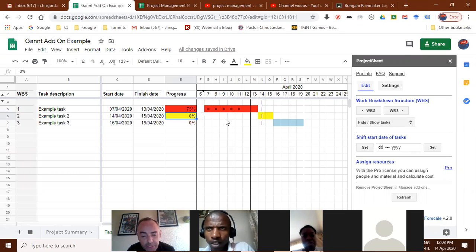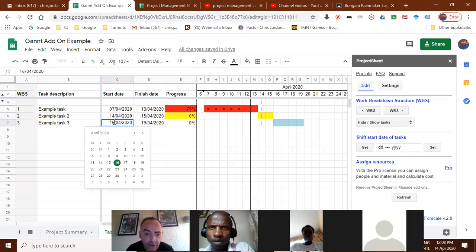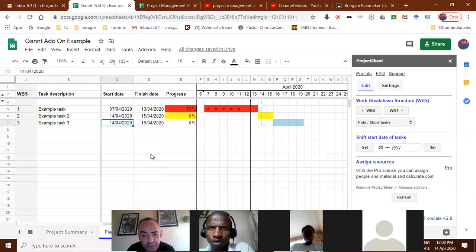You're more than welcome to, again, because these are finish to start activities or work packages, you can easily start this a little earlier, for example. So let's say I want to start this also maybe on the 14th. I'm going to find that the entire task will now move a little further. Do you see that? So now we have a start to start dependency. Again, this is by no means even close to what MS Project can offer you.